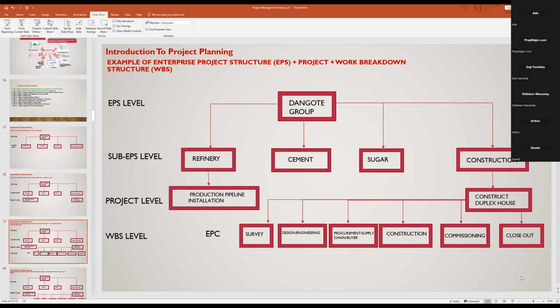And if they go past 5 days, I told you, you are supporting the cost as well. So if we're to spend 5 days and every day will cost us £500. If we budgeted £500 for 5 days, if they went into 6 days, it's going to cost us £600.